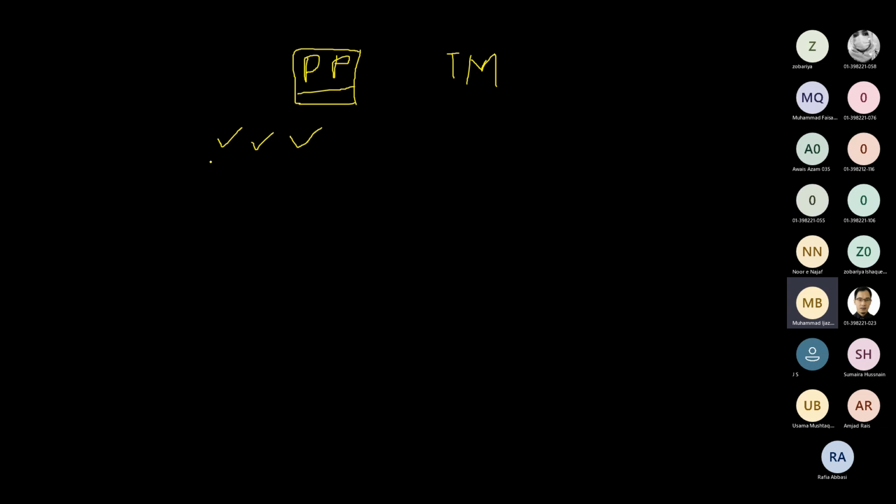We write a business case for that, a benefit management plan, and all that. Ultimately, this pre-project planning culminates in the initiation of a project through a formal document such as a project charter or any other document that we may use. So this actually initiates the project. So this is pre-project planning. This is the high-level planning that is done.